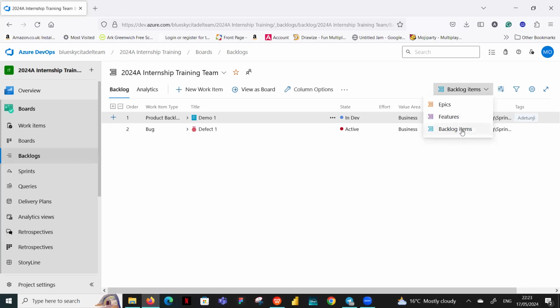So for the story that says I need to buy the ticket and all that, the activity that will be tied to it will now be you going on the website to look for, compare flight tickets and things like that. I'm just using that to give us an example of how you break down from the big chunk of what needed to be achieved at the end. So traveling is a project. So what do we need to achieve at the end? What are we looking at? I need to travel. How can we break these big chunks to also big but still smaller than this big one at the features? And then you have the stories.